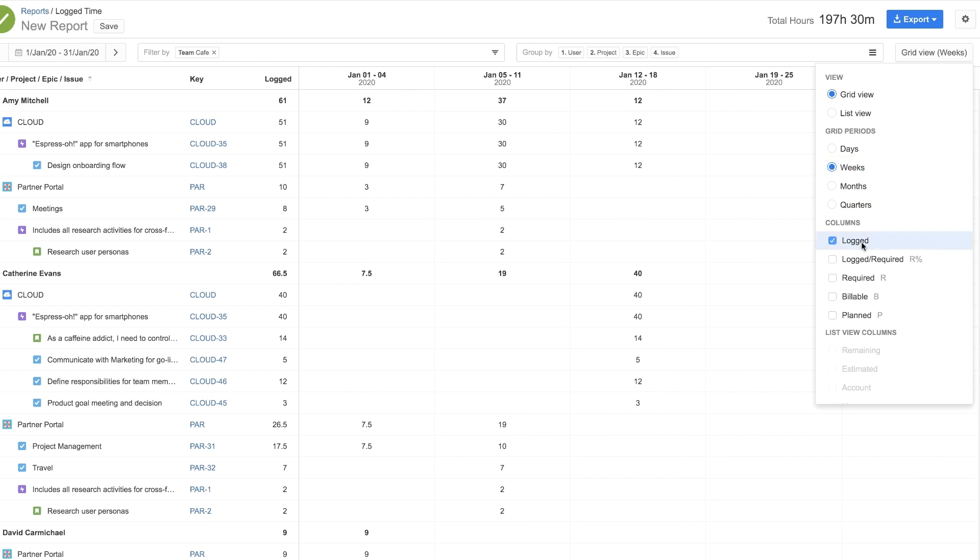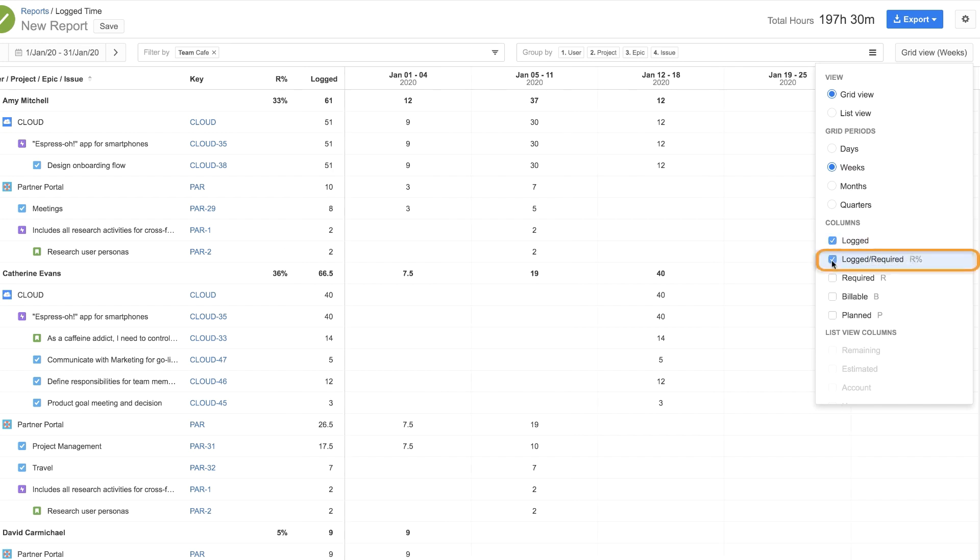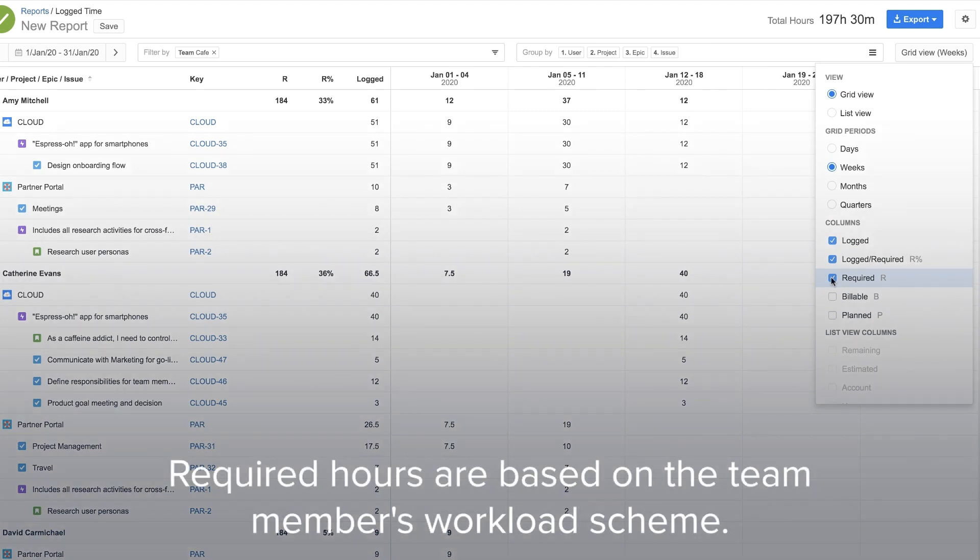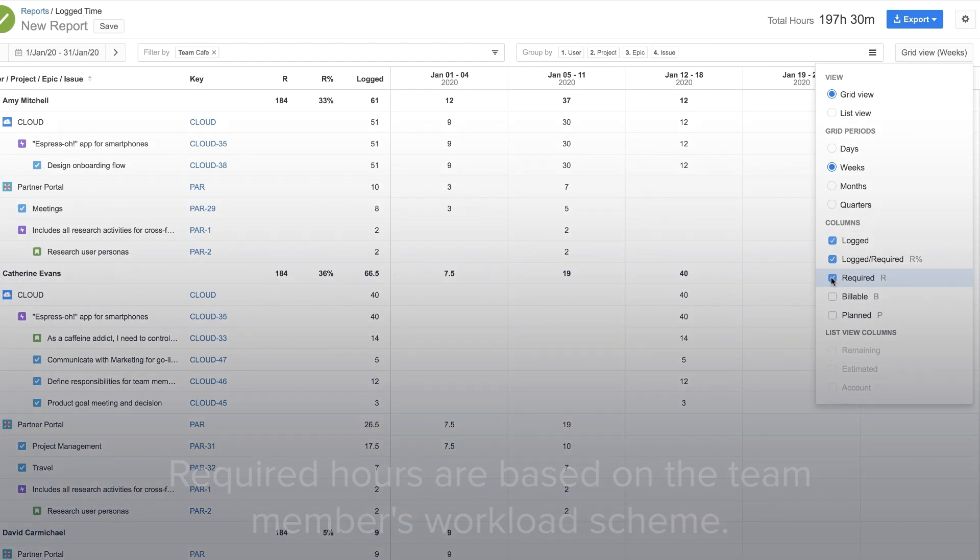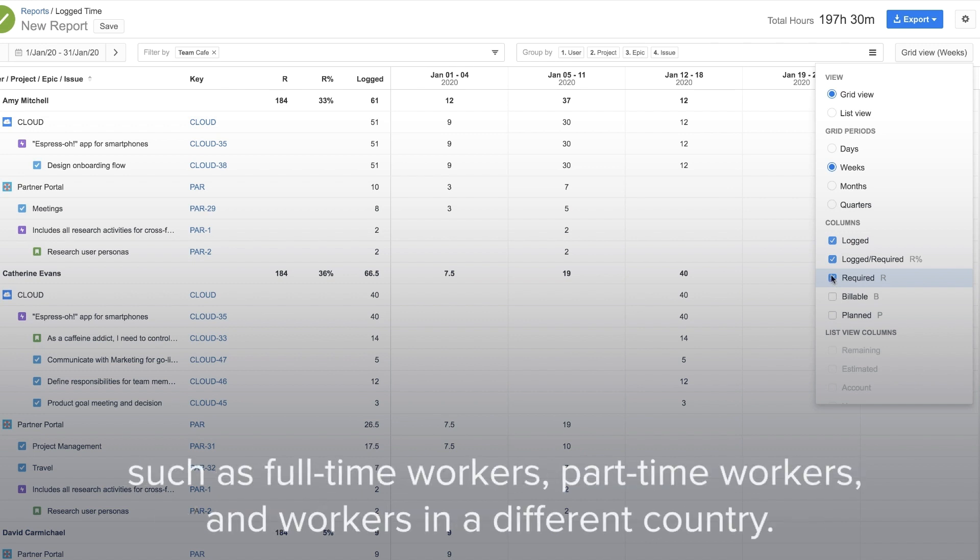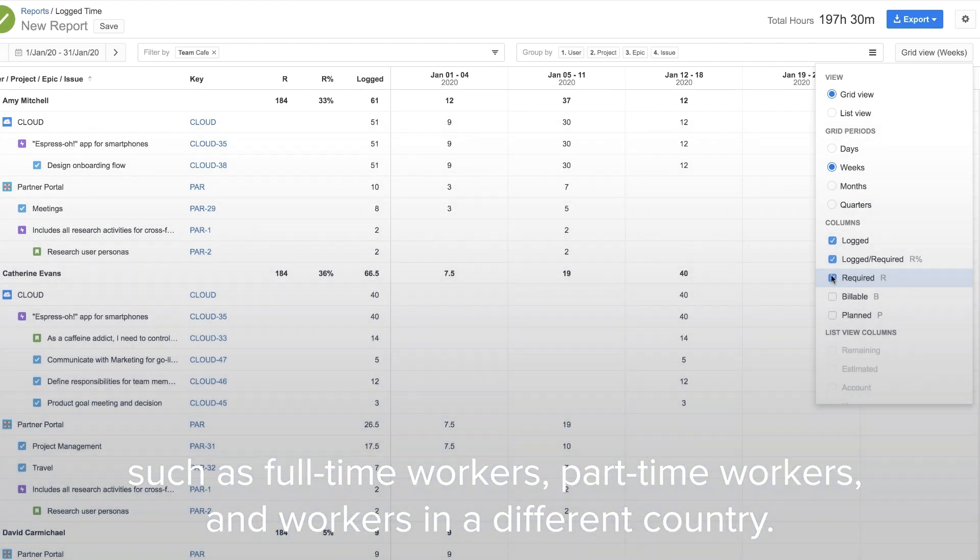By default, logged hours are displayed, but you can add the percentage of required hours that are already logged, and of course, the required hours themselves, as well as these other options. Required hours are based on the team member's workload scheme. An organization can have different workload schemes for different time requirements, such as for full-time workers, part-time workers, and workers in a different country.